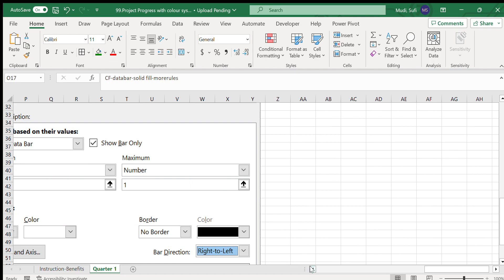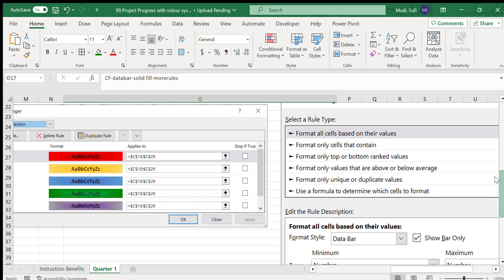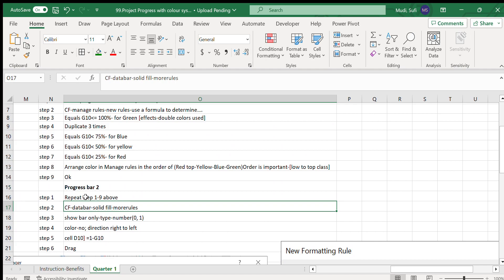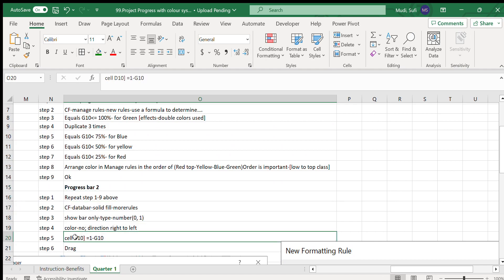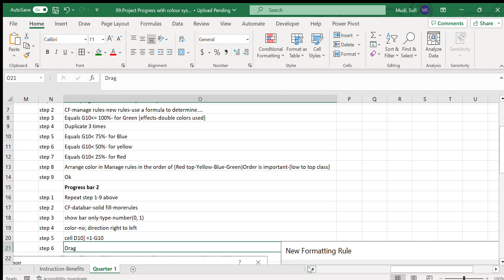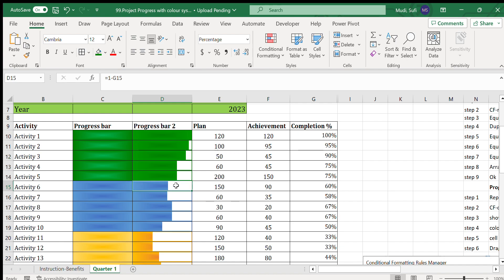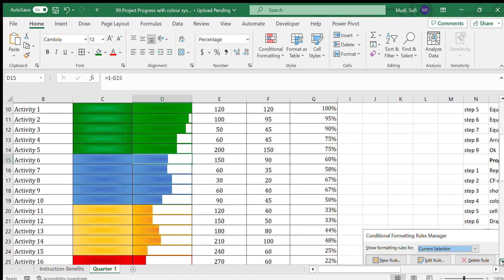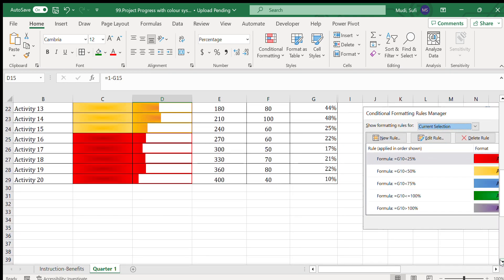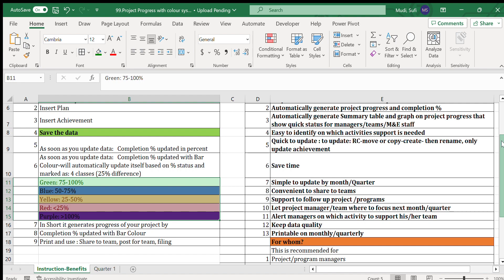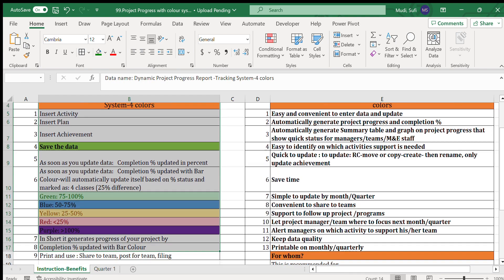For the type, we use numbering from 0 to 1, with no bar coloring and direction set to right-to-left. In the cell we enter the formula: one minus G10, then drag it for the remaining rows. The percentage will then be displayed with different colors and proportions.